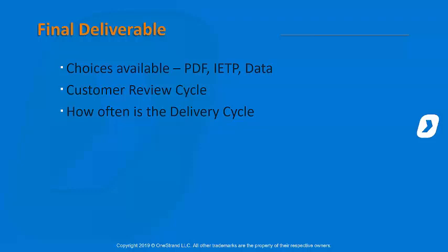So we've generated our deliverable. Doesn't matter what it is, but we physically generated our deliverable. We issue it to the customer. Now, feedback. Is it simply hand it to the customer, dust our hands and go, there you go? Not likely. So there has to be some sort of documented method as to how the customer is going to provide feedback. First of all, how are they going to accept or reject that deliverable? Well, with a data delivery, they need a way of validating your data is actually correct, correct both to schemas, breaks, all sorts of things.